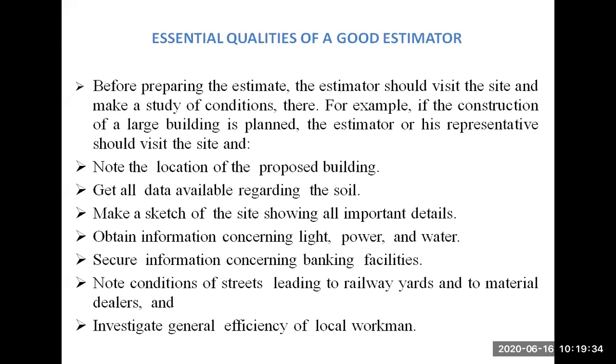You will get some idea about the local conditions if you visit the site before starting the actual construction. You know the local conditions very well, and then you can plan your particular activity. So the first step, whether you take a small work or a large work, any work, is to first visit the site and study the local conditions in detail, what problems you are going to face if you start this work over there. Then you can plan that particular work in a proper manner.